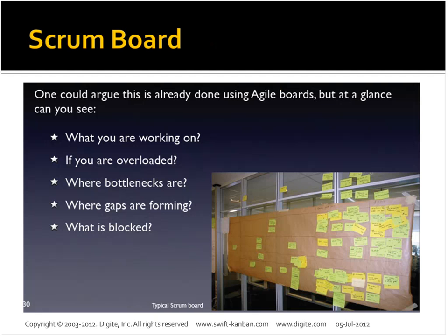With a Kanban board, at least you can figure out in one go what cards various team members are working on, how many are ready for QA to validate, or which are already past the QA stage and ready for customer acceptance. That way you don't need to wait for the end of the iteration to give a demo. You can always do a feature validation if need be.